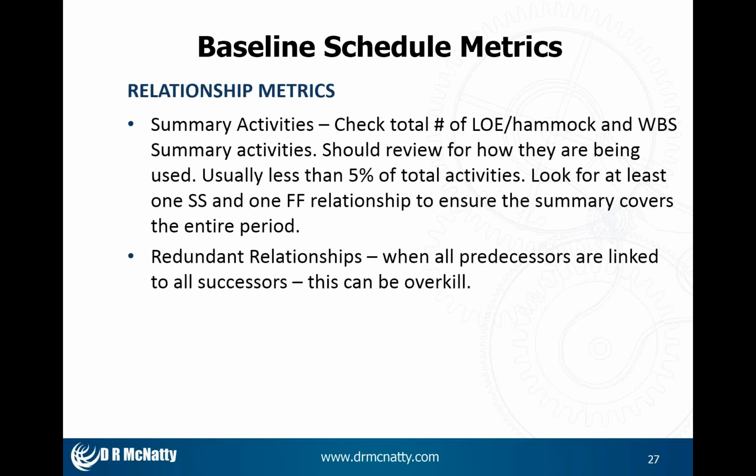Summary activities. I like to know how many level of effort, hammock, or WBS activities I have in the schedule, review them, and see how they're being used. They should be a small percentage of the total. I also like, on a hammock or level of effort, to look for the start to start and the finish to finish relationships to make sure that we're covering the entire time period of the detail that's driving that summary.